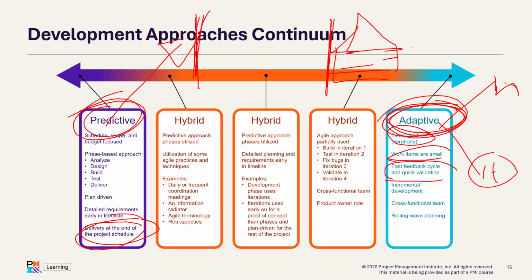The incremental approach will deliver results in bits and pieces as the project is ongoing. We don't wait till we finish the entire project before the customer gets something to put to use. So if you are using the incremental approach, you finish the ground floor completely, you hand over. You leave the rest unfinished. Then you finish the second floor completely, you hand over.